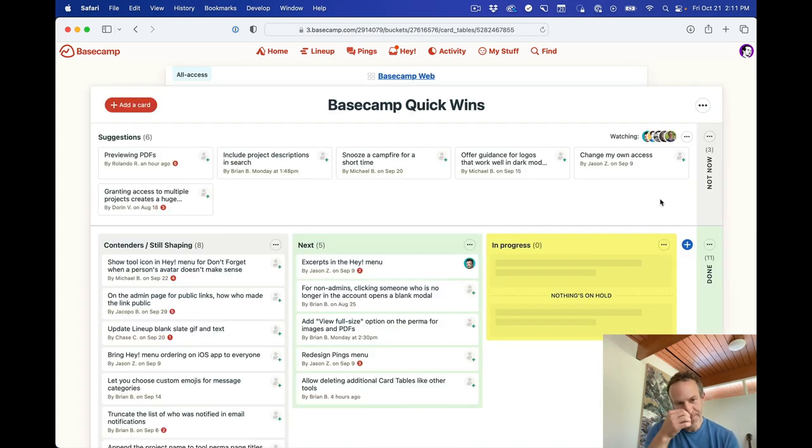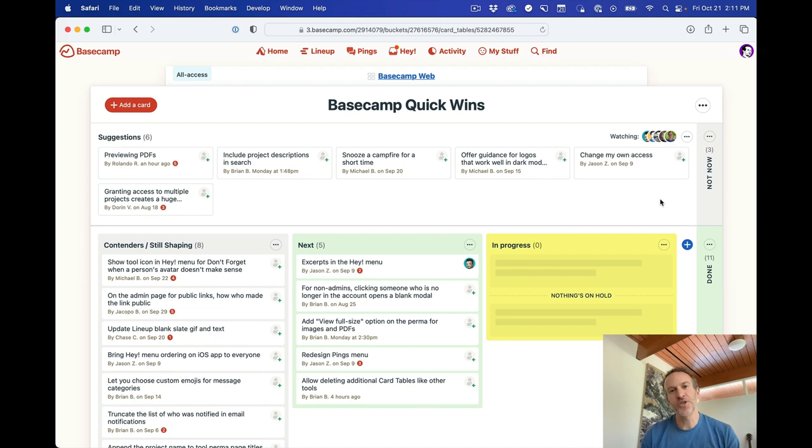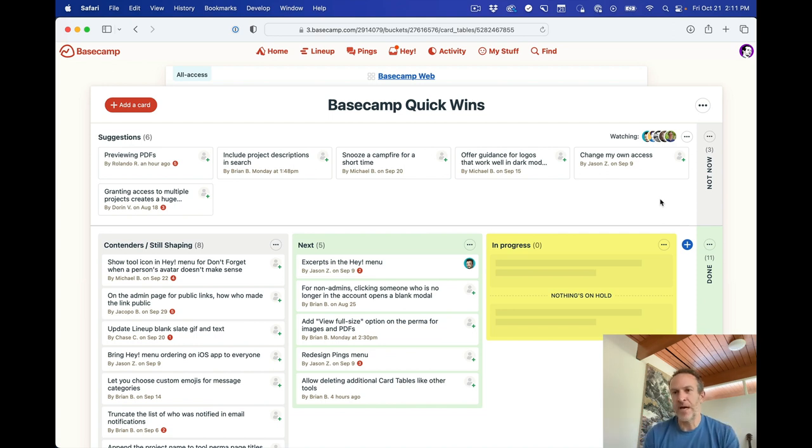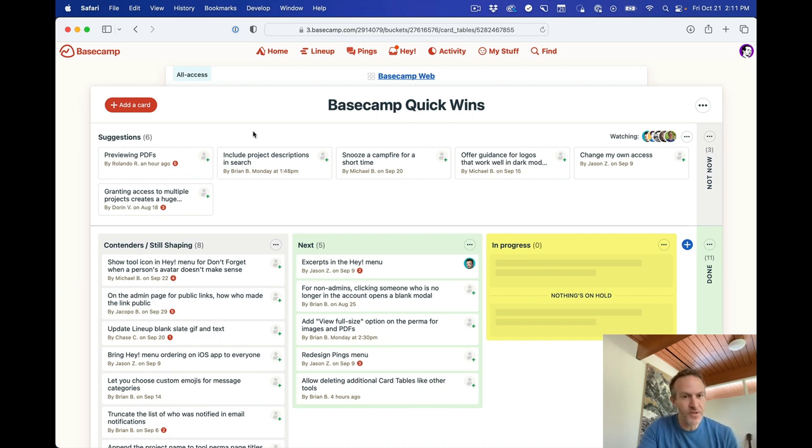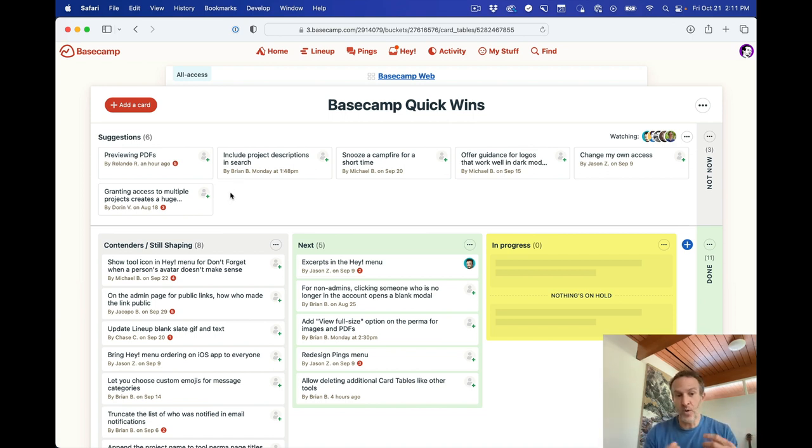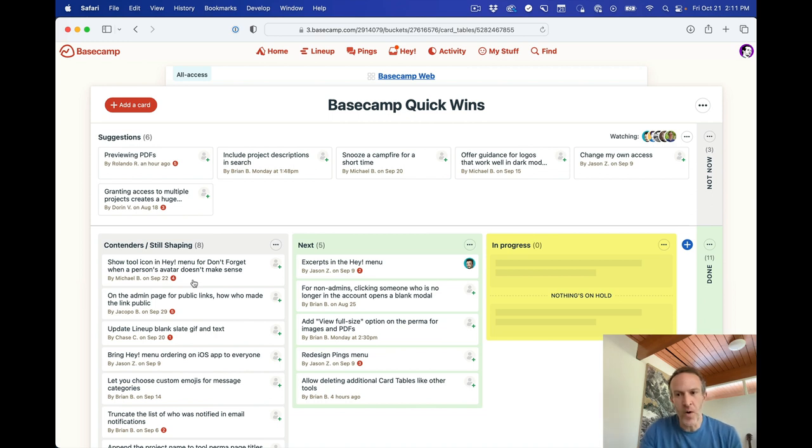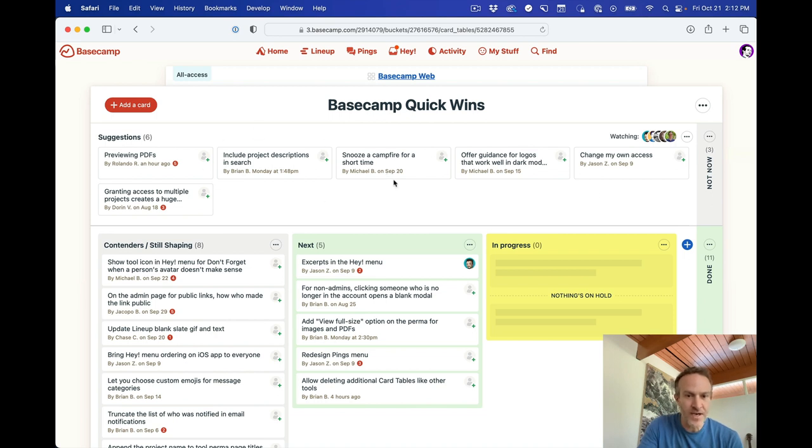So Quick Wins. Quick Wins is a collection of small things, small improvements we can do that people can pick off if they have some extra time. So we work on the six-week cycle timeframe, and sometimes projects end early. We also have a two-week cool-down in between cycles, and sometimes people have some extra time and they want to pick something off. Or they're waiting on something, they've got an hour, what are some of the quick wins we can grab? So this is where we're keeping these. So we have suggestions that pop in here, and anyone can add these suggestions. Things that we're actually considering or still need a little bit of shaping, so a little bit more definition, are moved down into here. And then we can move them through the process as we go, and then of course we keep track of what's done over here. You'll see in this case, there are five people watching this board. So anytime a suggestion is added, these five people will find out.